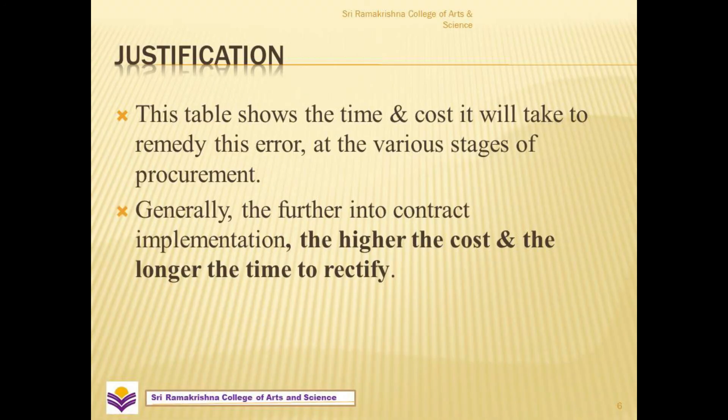Now let us see the justification of this case. As a management person, we have to justify this case. The above table shows the time and cost it will take to remedy this error at the various stages of procurement. Generally, the further into contract implementation, the higher the cost and the longer the time to rectify.